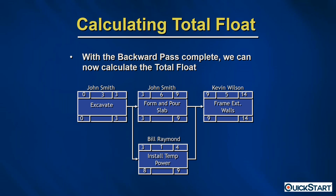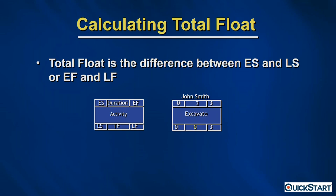Completing the backward pass allows us to calculate total float. Total float is the difference between early start and late start, or early finish and late finish — you can calculate it either way. For example, zero minus zero equals zero, or three minus three also equals zero. We now perform this calculation for each one of these tasks.